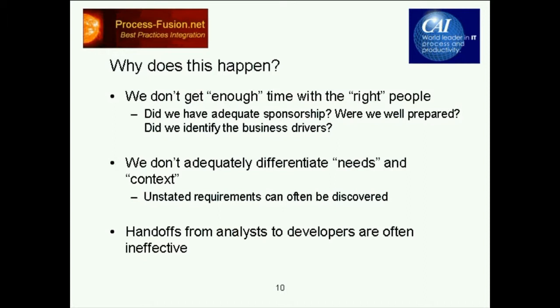I think another grim reality is something on the order of 80% of failed software projects had a totally unrealistic estimate from the very first day. I've worked on many turnaround situations, brought into situations where projects were very late and very far over budget, and in most of those cases, certainly 80% of those cases, one of the things I discovered was that the schedule that had originally been established and the estimates that had originally been developed were completely unrealistic.